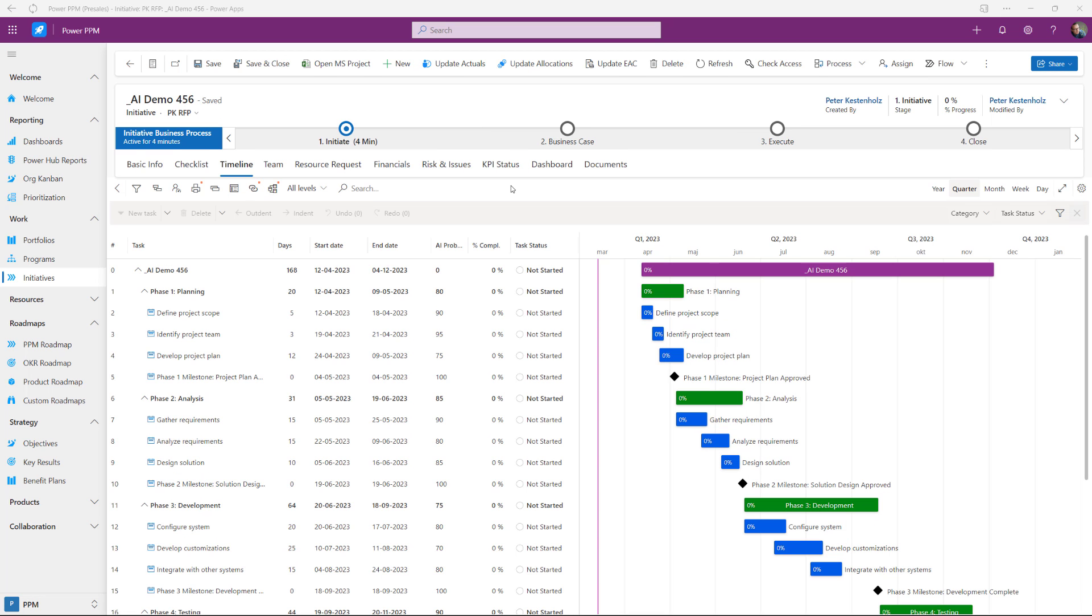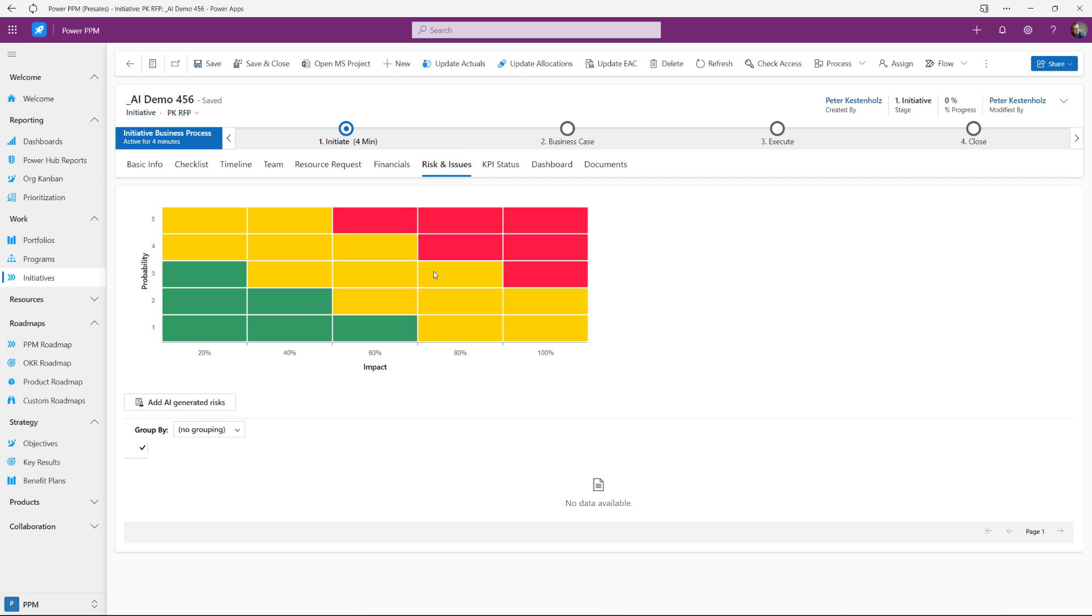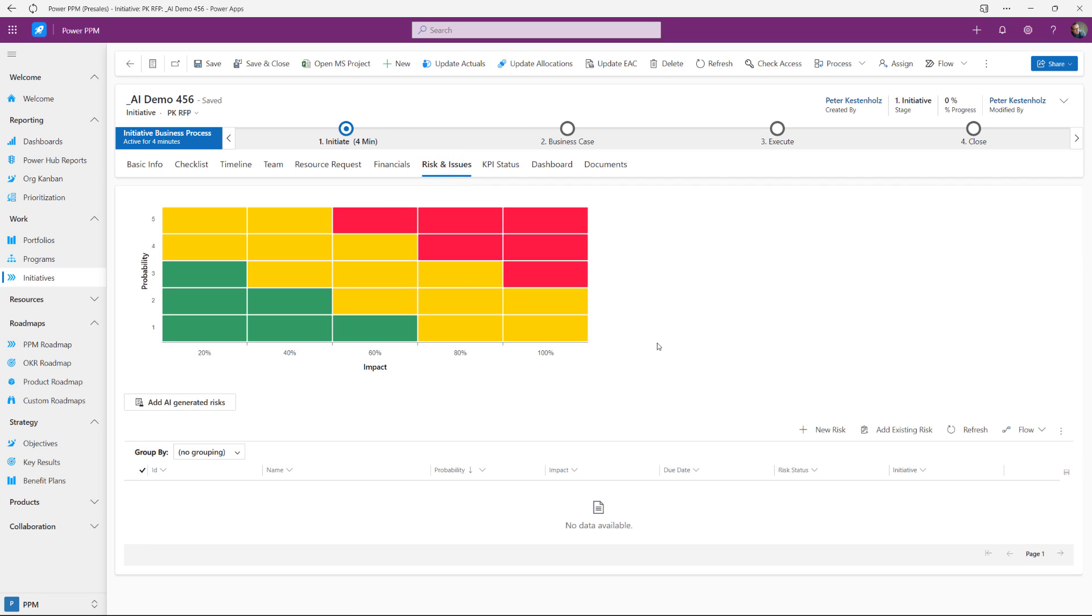Another example could be to go to the risk log here. And risks as most are familiar with is something that is often created already before the project is an execution. So here we are pre-loading risks that we could potentially run into and risks we have experience with from other projects and so forth. So rather than going here and click create each risk at a time,